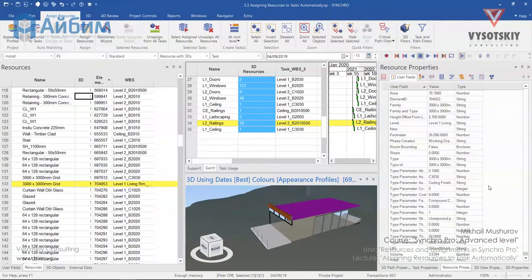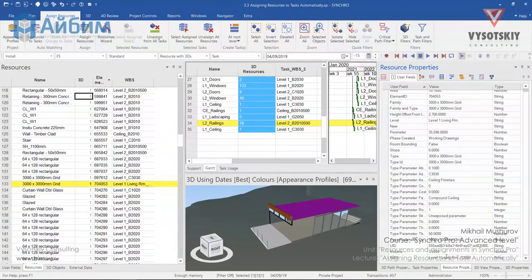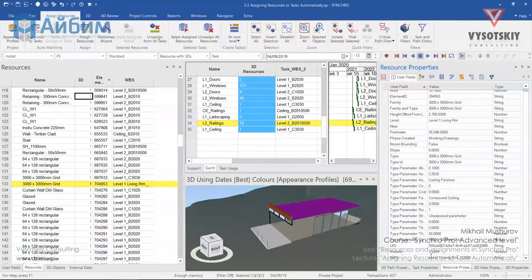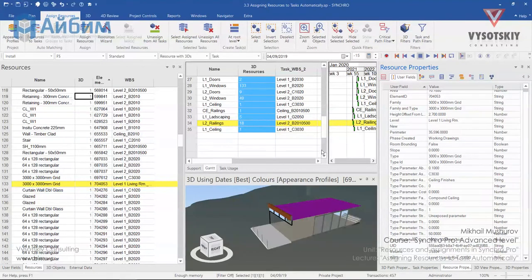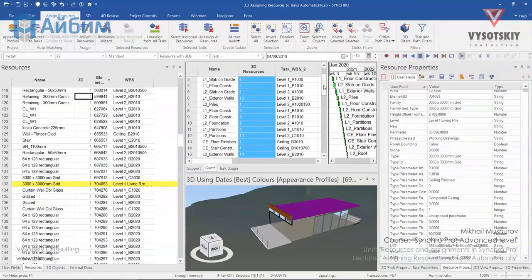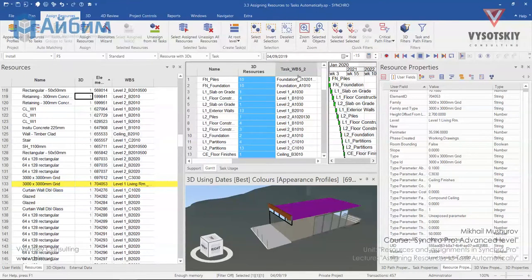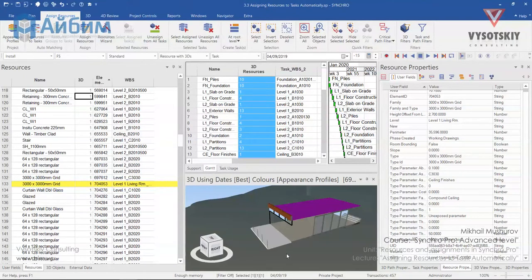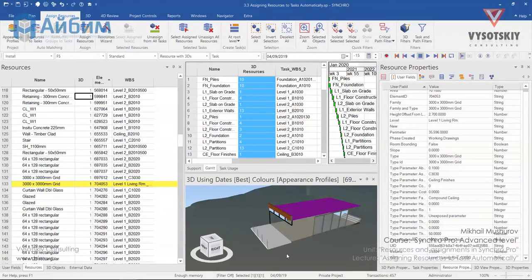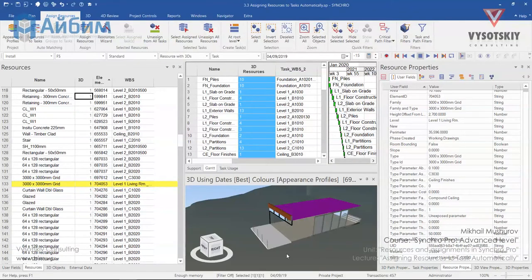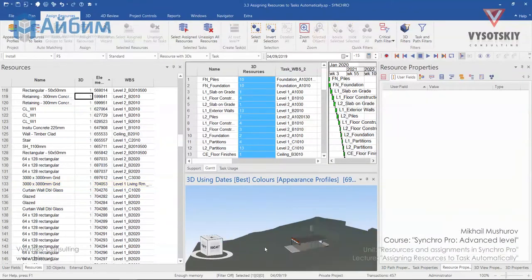Clear selection. As a VBS value, you can see that it's level 1 living room C3030. So such task VBS code is not existing in the table. In such situation, we need to create a report to a planning team. So they will revise work schedule and add missing activities to it.